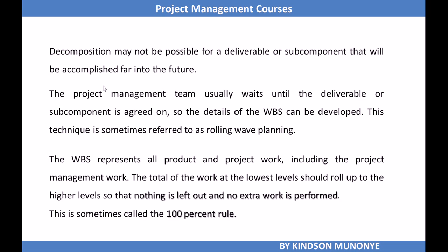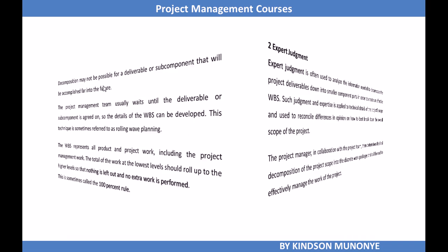Sometimes the project management team may have to wait until the deliverable or subcomponent is agreed on. More details are provided so that the WBS can be developed. This is sometimes referred to as rolling wave planning.